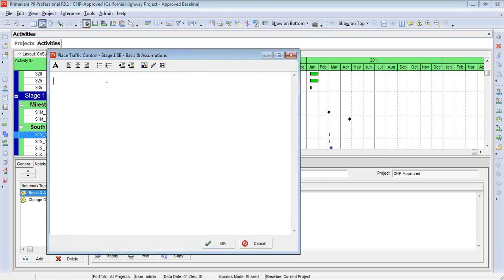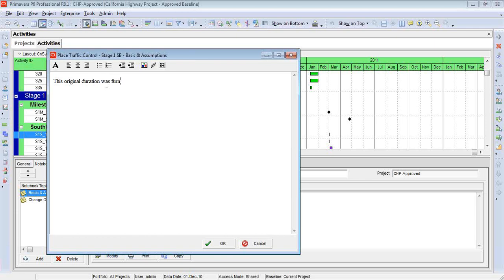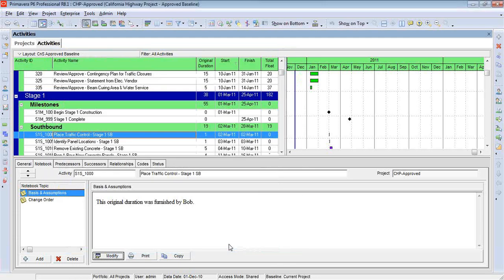Now I can come in here and say something like, this original duration. In other words, if anyone challenges me on why we put a particular duration on an activity, I can tell people or remind myself of where it came from.